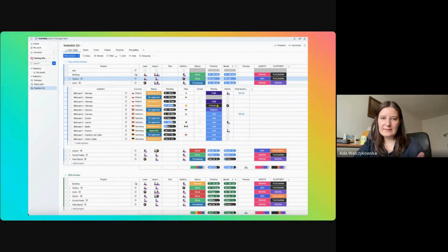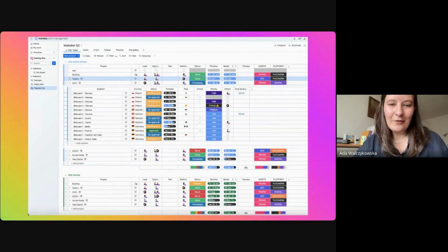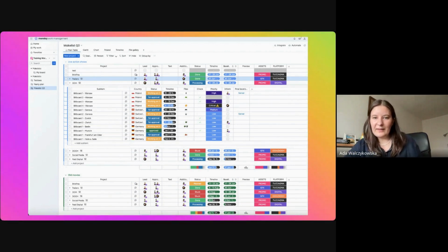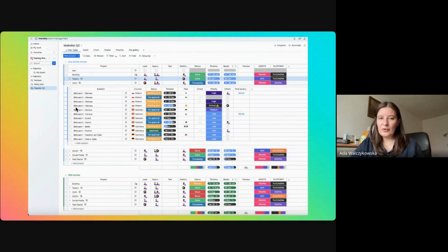And this is my most important pro tip for all the project managers. Whoever you are working with, and even if your client doesn't really work like this on a daily basis, make sure that when you have the make list, every final delivery asset is a separate item or sub-item, and it's not grouped together by formats or languages.